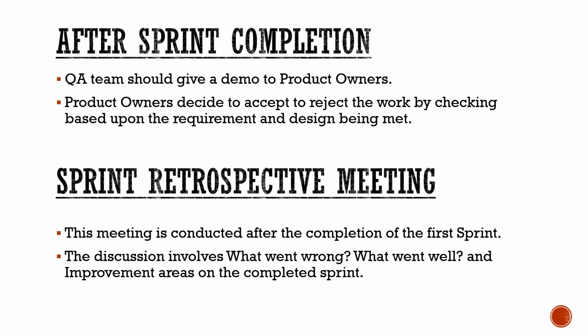And in this sprint retrospective meeting, we have various reports. Based on the reports also we can analyze: we have the velocity chart, and we have the burn down chart. The burn down chart shows the effort, how much effort we put on user stories and issues. And we have the velocity chart, showing how many stories we have completed within a particular sprint. So these things will be analyzed. Based on that, it will be planned for the next sprint, and it will be conveyed in the next sprint planning meeting.